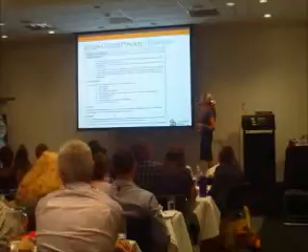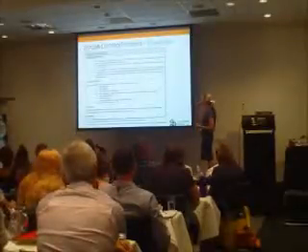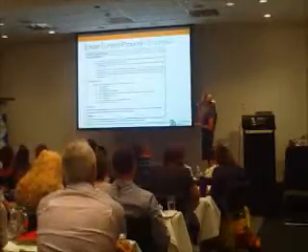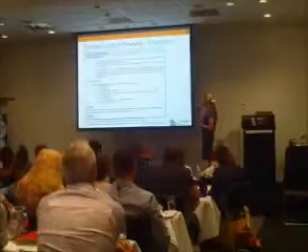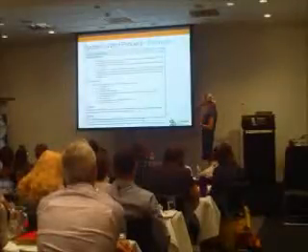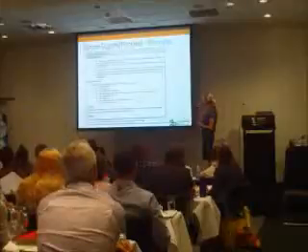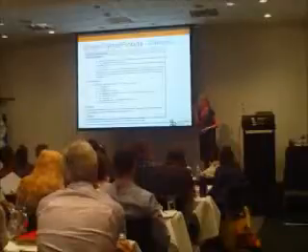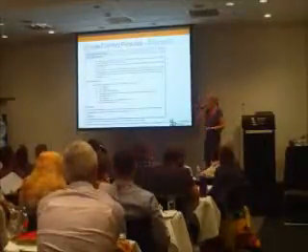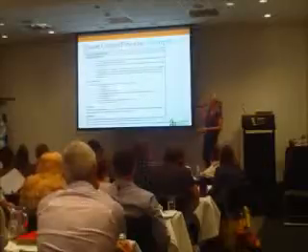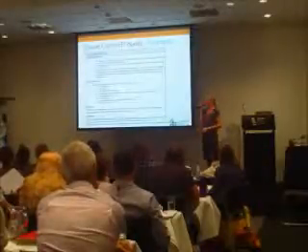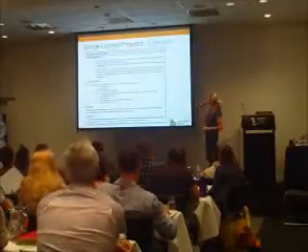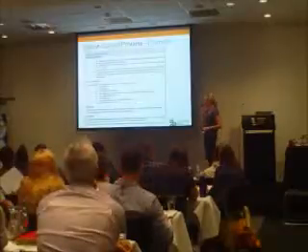So let's have a little bit of a look at an example. So if we're thinking about the 4-step process, the process for control, so if you identify a change which changes over the value of $50, a variation request form must be completed and submitted to the project manager for approval. It'd be funny on your project, it'd be for variations over 5 cents. You've got to do a form, you've only got a $40 project. $50 could be $500, it could be $5,000, it depends on the authorisation levels of the managers on that project. For changes under the value of 50, an email must be sent to the project manager advising of the change.